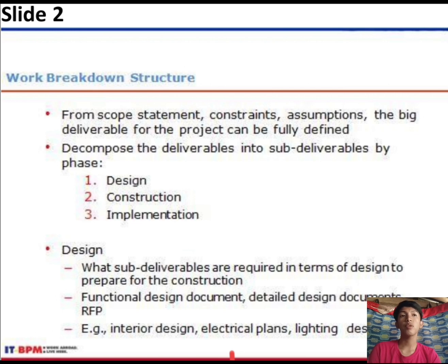So when creating a WBS, decompose a deliverable into sub-deliverables by project phase. You may include all the project phases or focus on certain areas depending on the scale and complexities of the project, such as approval and scope, design, construction, testing, and implementation.